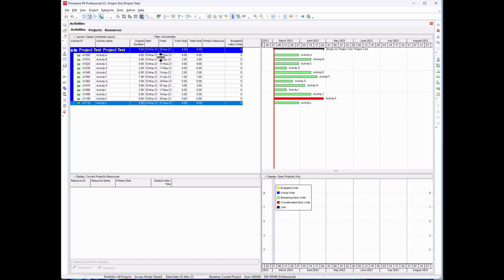Before we press schedule, what we need to do is link the activities. As you can see here, the critical path, like we discussed, is the longest path in your program, or the shortest period in which you can finish your program. Because I've scheduled without linking the activities, the program is telling me that this is the critical path because it's the longest, with 8 weeks duration.